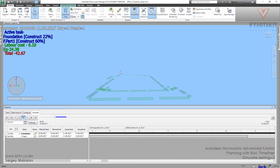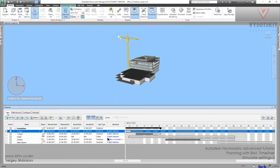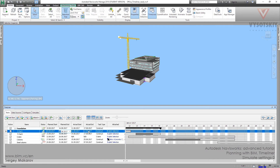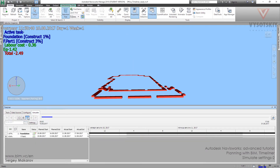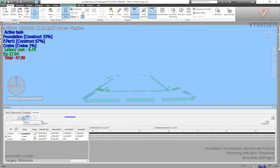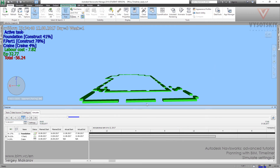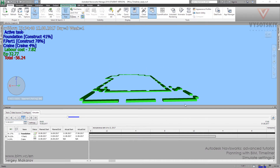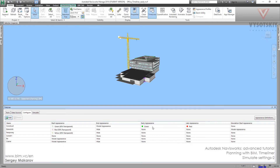What about the end? Let's go to the task and try the early end — let's make the planned date to the 13th. Now the actual end is a little bit earlier than planned. Let's go to simulate. In these settings, in the Planned Actual Differences, we can see that early end is highlighting and the elements are yellow because of the Early Appearance setting.